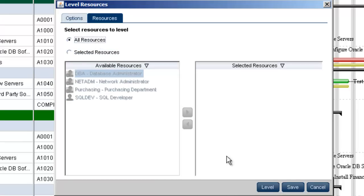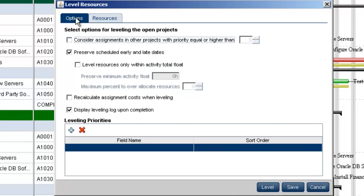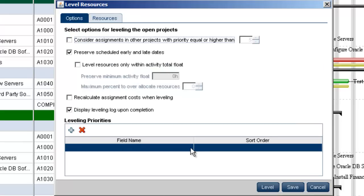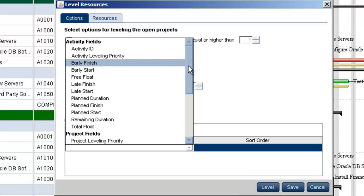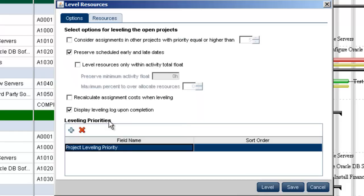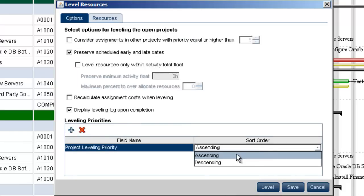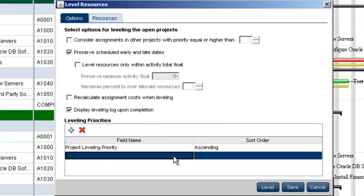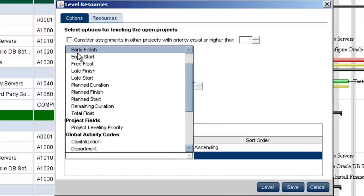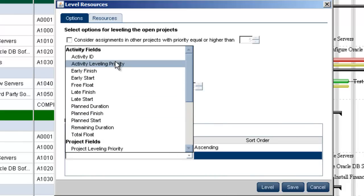Back in the options tab, we will add leveling priorities at the bottom of the dialog. In the first position, the project leveling priorities field has been selected. In the second position, the activity leveling priorities field has been selected and both have a sort order of ascending.